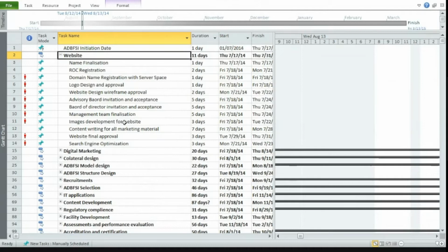So what you understood from this is that one was a major task known as website, but then there are subtasks. The subtask can be further drilled down, or in this particular case it can be kept as it is. Okay, because suppose this is the last task which I have to do, which will not get fragmented further, then this is known as a WBS, work breakdown structure.